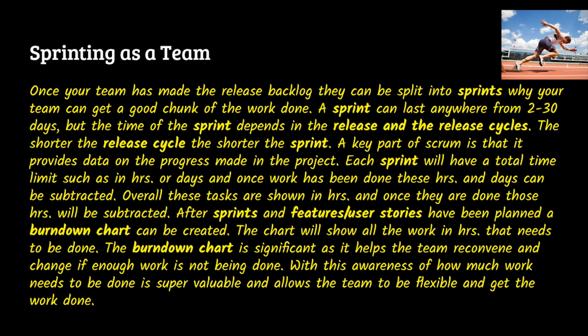So, as said before, all those feature/user stories should be split into hours ultimately. And each sprint will be made up of these user stories, and those user stories have a set time for them. Ultimately, those times will be compiled into a sprint. So I might have 44 hours in a sprint. That's showing the work that needs to be done.